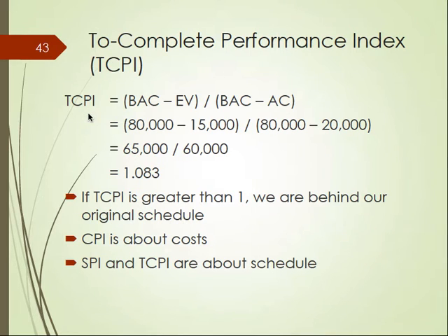At any point in the project, if TCPI is greater than 1, that means we should work faster to catch up on the time. Otherwise, we would be behind.